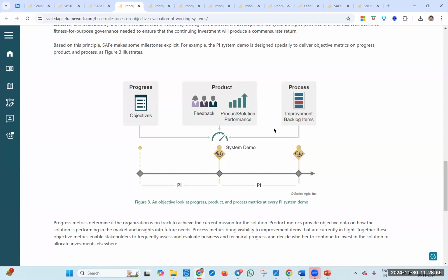Yes. See, sometimes even some of us might get confused with the terminology. That is fine. It could be your organization-specific terminology also. We'll say that in my previous engagement, we used to call it major release, minor release. Every alternate week, alternate sprint, we do a minor release with small enhancements, small fixes, patches sort of thing. Once in a quarter, we do a major release.